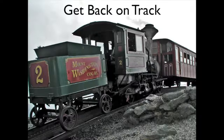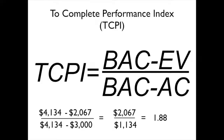One of the things we can do is try to figure out what our performance has to be in order to get things back on track. That's where one more performance index comes into play — the To Complete Performance Index, or TCPI. This basically says if we're going to try to meet our original budget, what does our cost performance index have to be going forward? When we do the calculations, we find that our TCPI is 1.88.